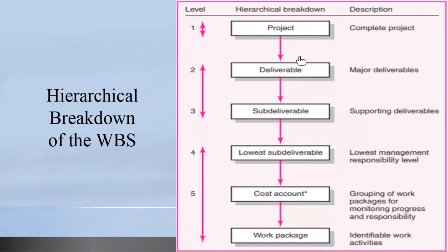The entire electrical works installed, tested, commissioned, fully operable would be another deliverable. All of these are big ticket items. The installation of furniture, if it's a part of the project scope, would be another deliverable. So that would be your level 2 headings.